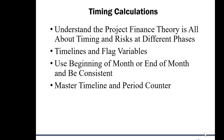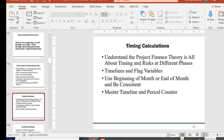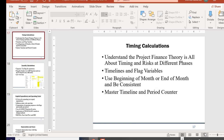When you construct the plant you have risks of cost overruns, delays, and construction risks, but after construction finishes that risk is gone. Then you start operating and have some hiccups at the start, but when you finish the ramp-up that risk is gone too. So getting a timeline with flags for the beginning and end of each period is a big deal.